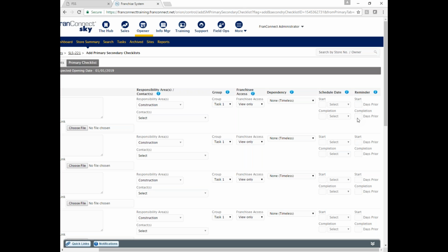You can also send them a thing that says, let's say this is a 2-week task. You can send them another thing that 3 days prior to the scheduled completion date says, in 3 days, this completion date is due. So 2 are going to happen no matter what. You can set a 3rd one and a 4th one right here to warn them that those start dates and completion dates are going to be up.